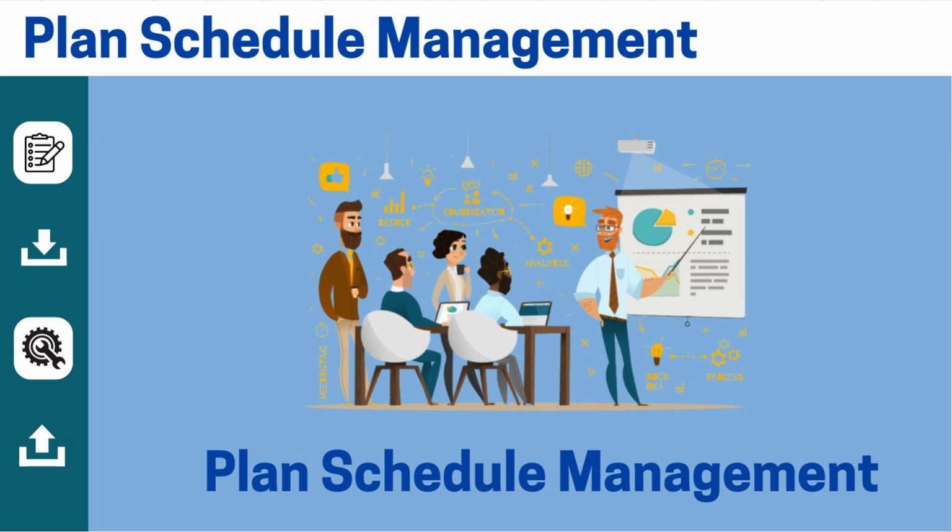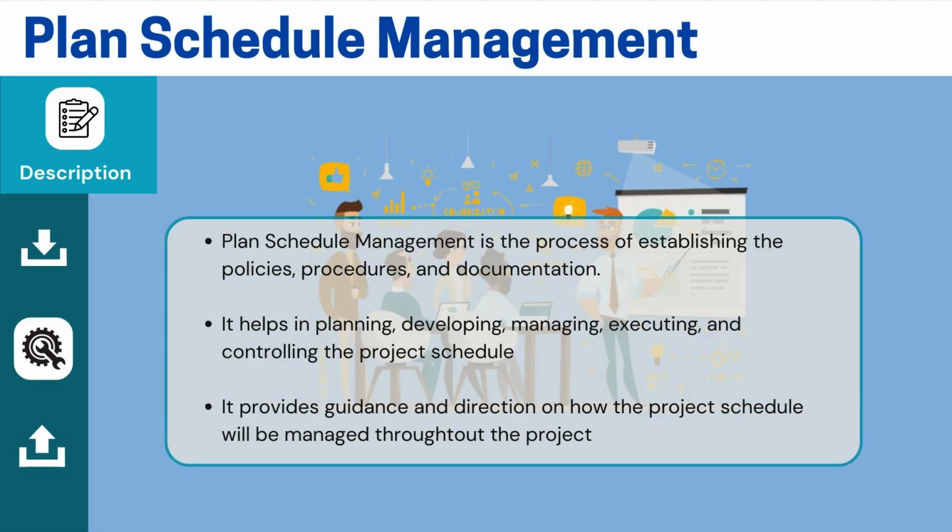In this process, we create a plan for schedule management, documenting activities, procedures, policies, schedule models, and estimation techniques. Proper documentation ensures effective planning, development, execution, and control of the project schedule. For example, we document our approach to sequencing activities and estimation techniques. Should we use PERT, bottom-up estimation, analogous estimation, expert judgment, or another technique? As a team, we agree on these aspects and document them in the plan.